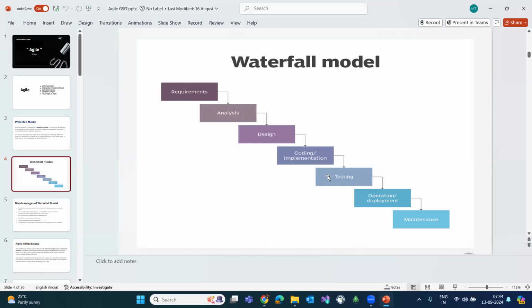Okay, so guys, since we are developing software step by step, the development team and testing team each have a particular time. At that time only they will work. Until the development is done, the testing team will not start their work. It is very costly cost-wise, since they don't have work but we need to pay them. We will deliver the software once the entire development is completed, guys. So it's time-taking.